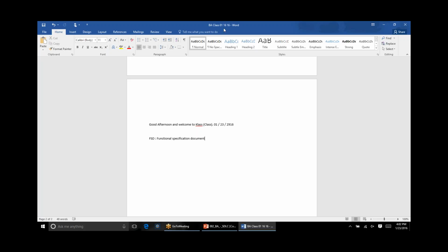So this methodology assumes that once you do analysis, most of your business requirements have been documented and validated. Having said that, it is possible that some of the business requirements can further come into the picture. So a lot of people do something called a change request process, in which new business requirements can be incorporated. But this approach is not iterative.